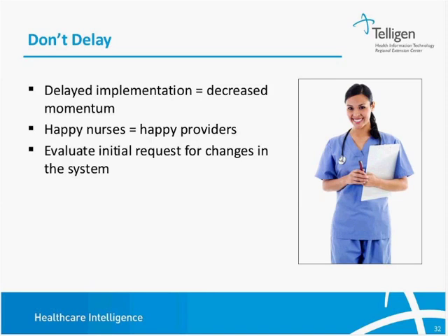Some of it may be a knee-jerk reaction. Some of it may just be acclimation to the change of processes. So again, go to the staff that put those requests in and talk it through with them and understand what they want, but not necessarily changing everything all at once, because you need a little bit of time to get a status quo going. And if it's something significant and you really feel like it needs to be changed, obviously go ahead and change it.